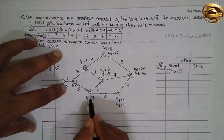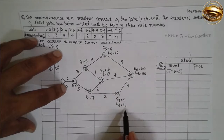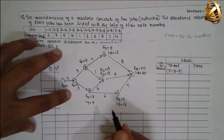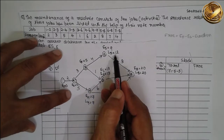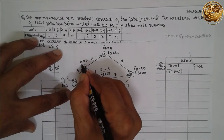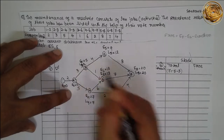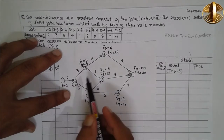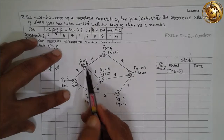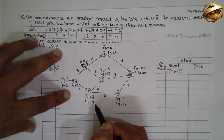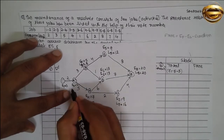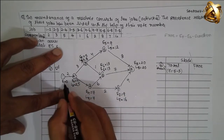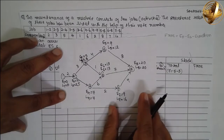At the junction, select the smallest value. We have 13 and 16 — select 13. Thirteen minus 6: L4 equals 7. Twelve minus 4: L3 equals 8. At the next junction we have 8 and 7 — the smallest is 7. Seven minus 5: L2 equals 2. Finally, 2 minus 2: L1 equals 0.